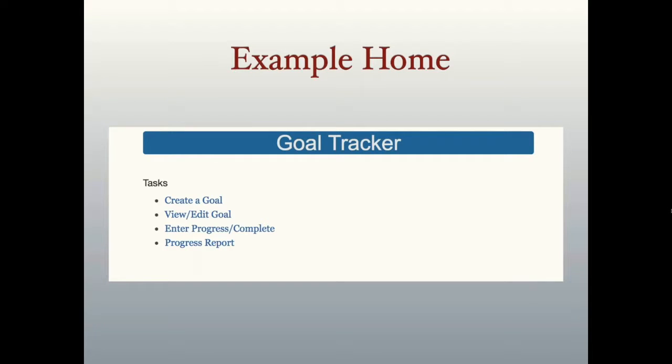Customers will even do that. You'll throw some stuff at them and they'll say, I really don't like this and this and this. And you say, well, we just put 50 hours into solving that problem. And they'll say, oh, well, and then you fall into what's called the fallacy of sunk costs, because they're going to say, well, if we put that time into it, it's got to have value, even though it may not. So, as I've mentioned several times, you want to keep it simple. You want to get the ideas across. It may grow into something more complex as you go through iterations, but definitely keep it simple.